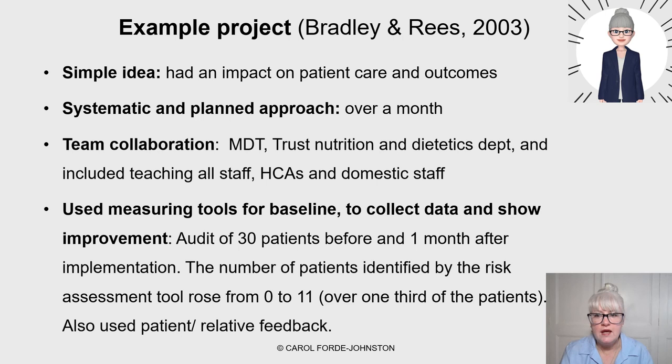And how Bradley and Rees did that was an audit of 30 patients before and then 1 month after implementation. And there was a risk assessment tool that was used, I think, WASP is the name of it. And the number of patients identified by the risk assessment tool rose from 0 to 11, over one third of patients, because they were really trying to improve awareness and highlight patients that had these nutritional needs. So they increased awareness, essentially. And they also used patient and relative feedback.